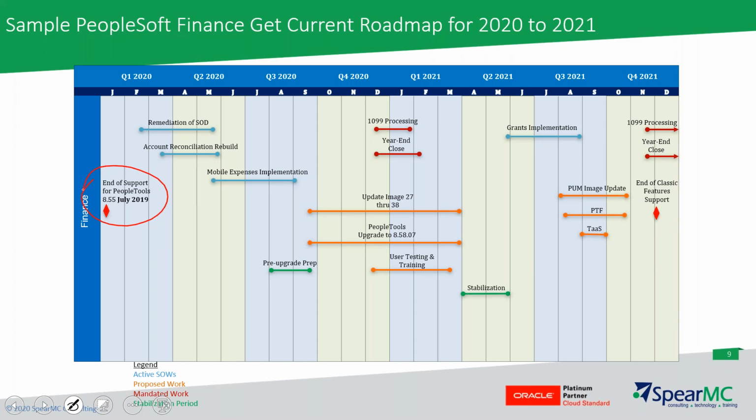Another good outcome of a roadmap is being able to say, for instance, in the top left, we have segregation of duties and account reconciliation in parallel practically. Those resources are the same. Are they going to be able to do their day-to-day jobs and still do these two projects? Now you can do a full blown resource planning matrix to really identify by individual where their hours are residing, but it's another benefit of having this visual or roadmap, so you can see really where it is, and you can recall it continuously.